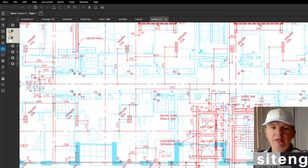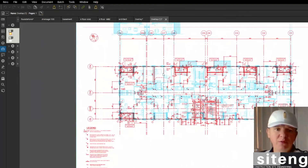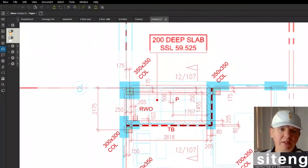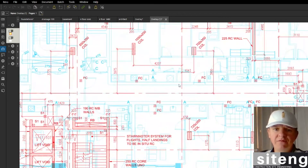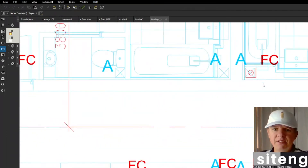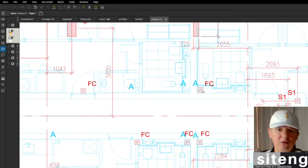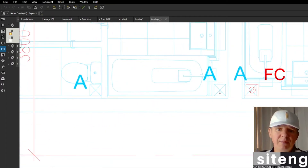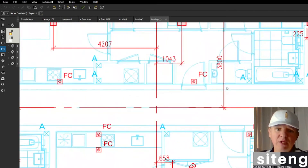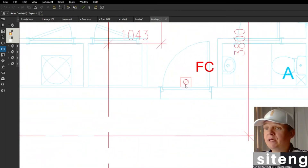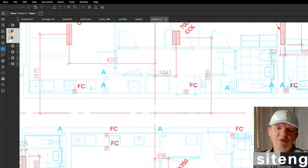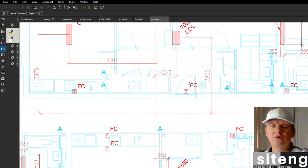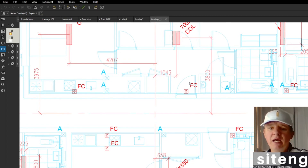Looking at the result, we can see straight away that something is wrong. The drawings are overlaid correctly — there's nothing wrong with how we brought in the drawings — but the penetrations are completely different between the two drawings and it doesn't make sense. We're missing a penetration on the structural drawing, and there's a penetration shown in the middle of the entrance to the flat on the M&E drawing. In the next video, I'm going to show you how to raise an RFI for this discrepancy — how to find information and raise it in the correct manner.